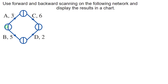Going along the A path: C can't start until A finishes. If A starts at zero and takes three minutes, it finishes at minute three, so C can start at three. For B: B starts at zero, takes five minutes, so it finishes at minute five — zero plus five is five. We can now work out each path, but we have two paths coming into a single node.